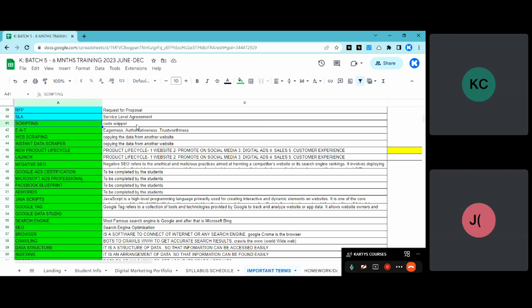Now, you have to send the report to the management, right? If the project is, let's say, 72 hours, you might have to send a report every 24 hours. Okay, to tell them, this is a work in progress, this is what I've done, this is stage 1 or stage 2, and we are working on it. After that, what is the next?